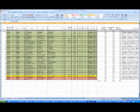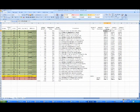So what that does then, to scroll back here, I apologize for scrolling so much, but we have a finish start relationship from left to right, and then we also have a finish start relationship between one row to the next. So the milling on 61,590 has got to finish before the milling on 61,506 can begin. So you've got a finish start this way, a series of finish starts this way, and then you've got a finish start relationship between the video and the milling, and a finish start between point repairs and milling.